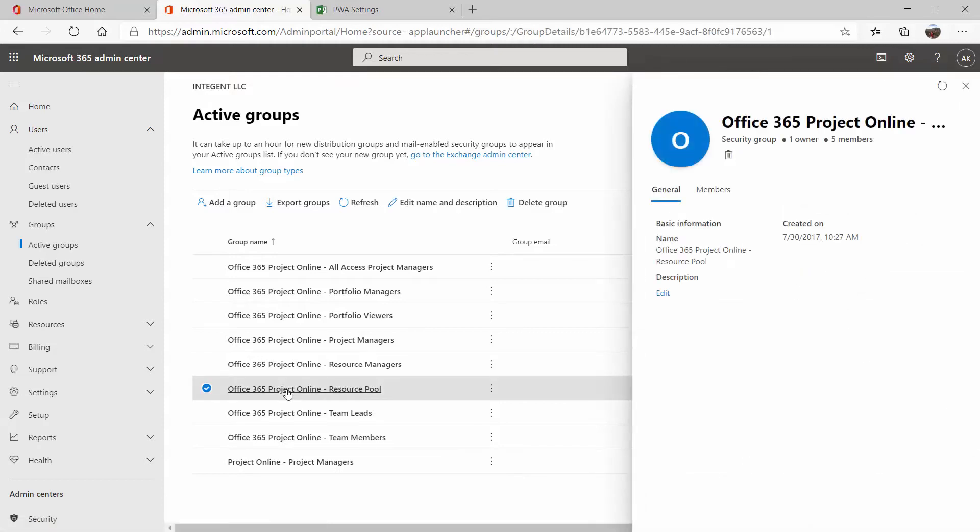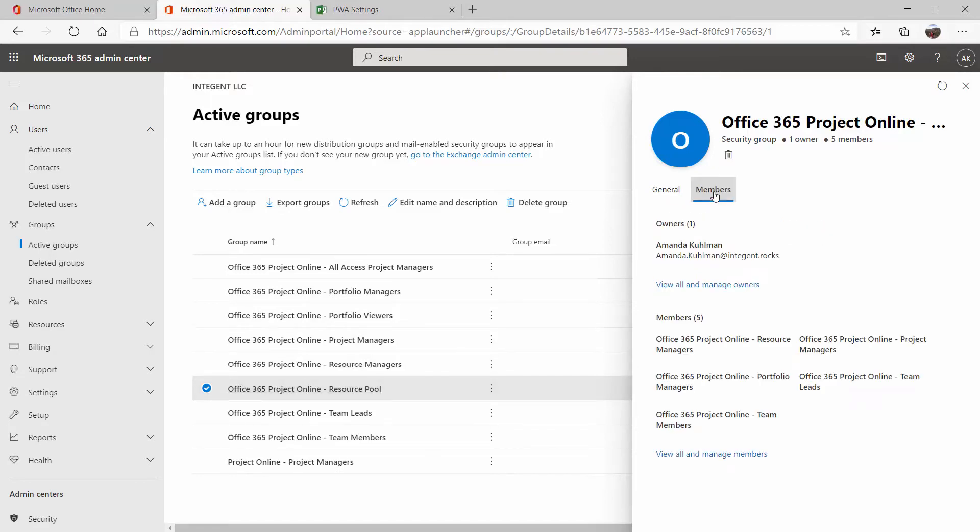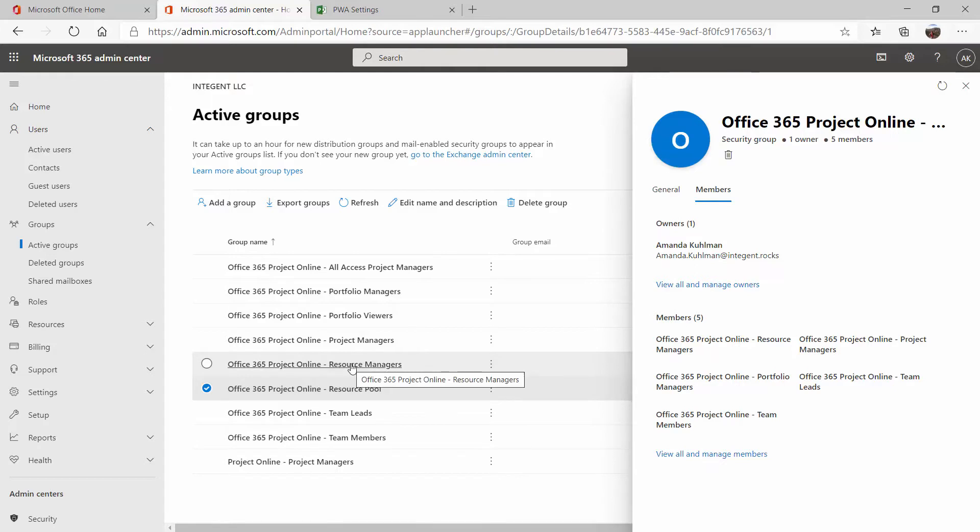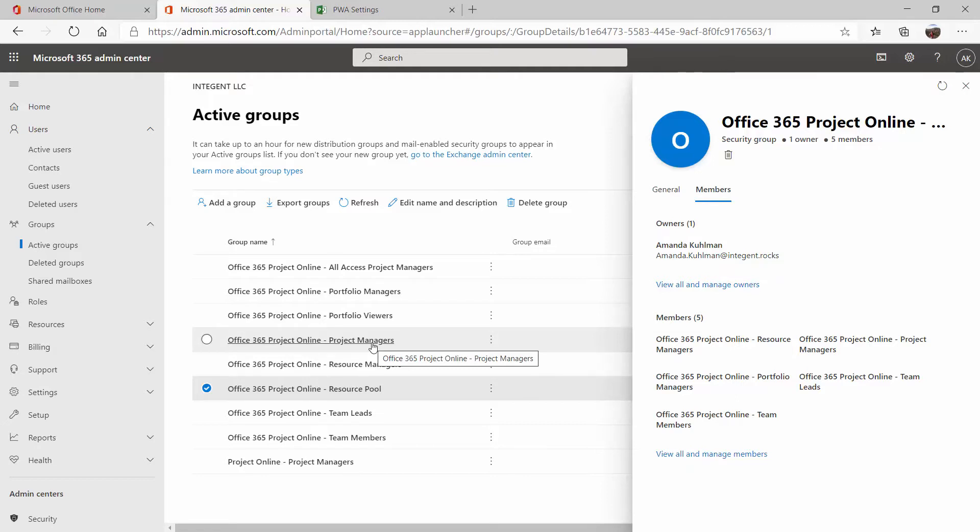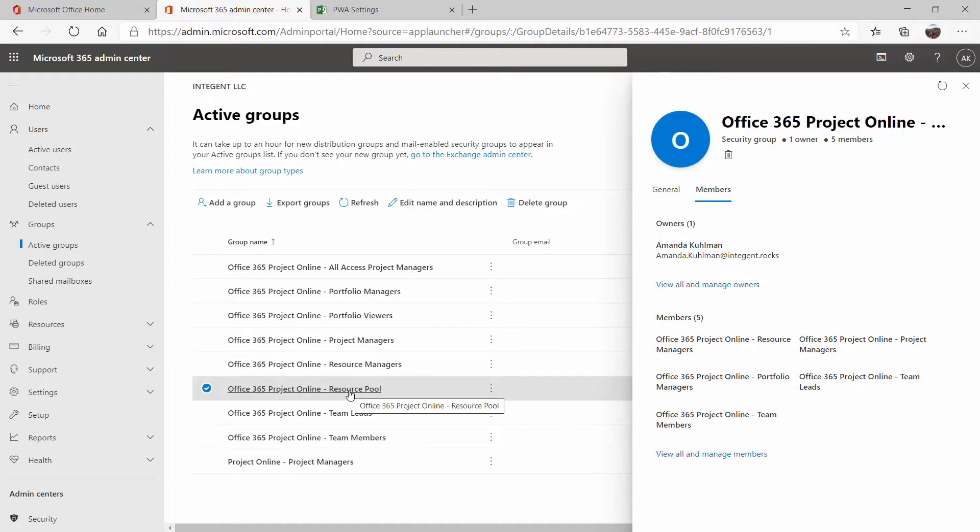One recommendation that we make when setting up your security groups is that you create a hierarchy of groups. So your resource pool group, and we'll click on it here to look at the members, the members of this group are the other security groups that we have set up. This helps to streamline your process. If you need to add somebody to your project managers group, for example, I can add them into that group, which since it's syncing to Project Online will grant them the proper permissions in Project Online. But at the same time, it'll also add them to the resource pool within Project Online so that way they can also be added to tasks once that sync takes place.